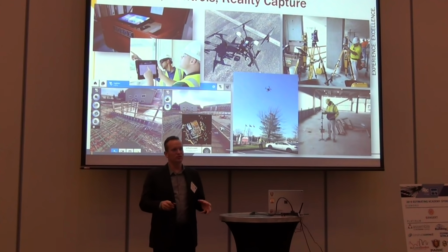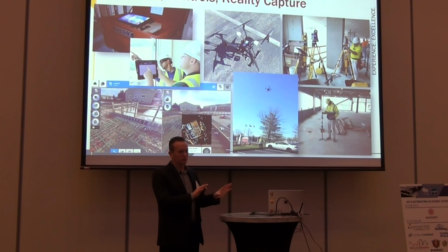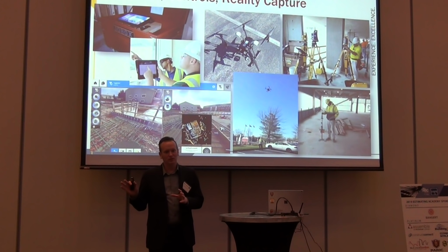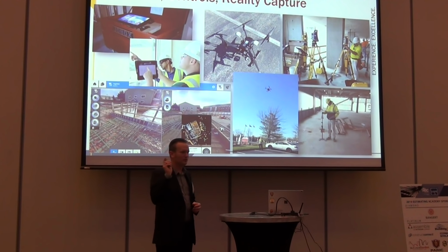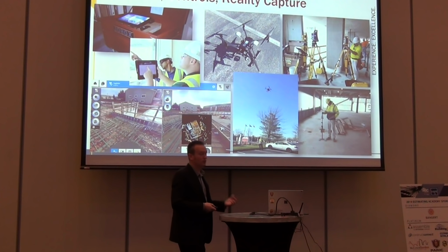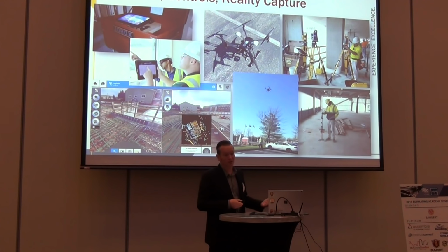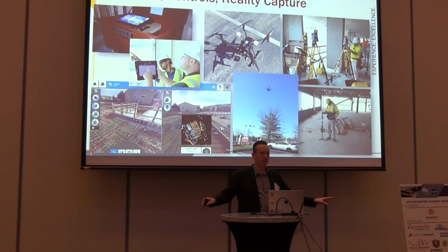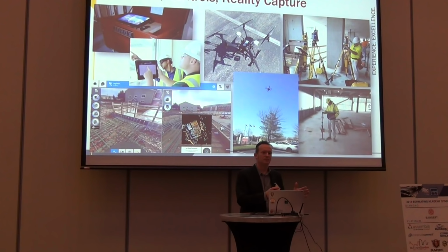I'm going to have circulation issues for people walking around. What I'm communicating with them in those logistics studies is totally different than what the project manager sees. He sees opportunity for laydown areas, for how we're going to put the parking or the job trailer on the job site, how we're going to do emergency egress, and where the crane route is going to go. Totally different visions, same set of data, right?